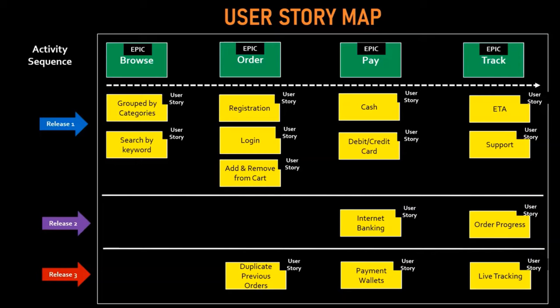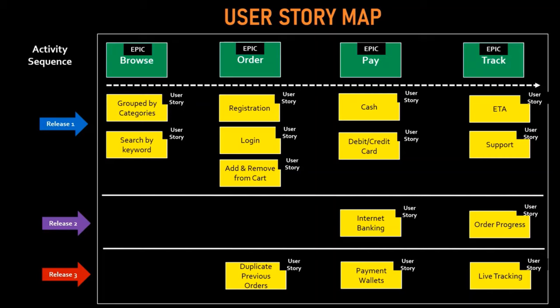If you're not familiar, this is how the user story map looks. It has a series of epics with an activity sequence from left to right — the steps the user would take to achieve the objective. They'll be able to browse the available foods, order via the application, pay for it online, and then track it until they receive it. Below those activities are the user stories, grouped into releases: release one, two, and three — highest value first, then subsequent releases.